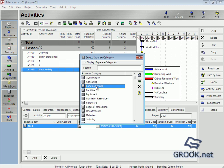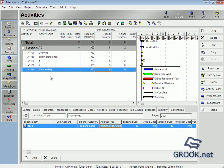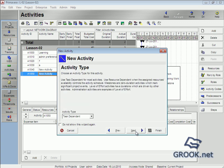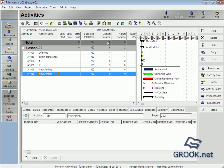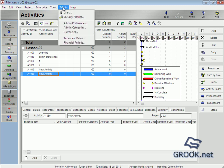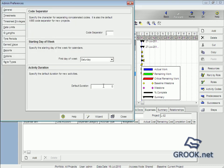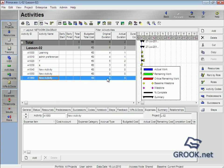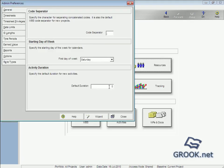In our projects and WBS, if we add a new activity, the wizard helps us enter data — Next, Next, Next, Finish. Here we find original duration is zero because in Admin > Admin Preferences > General, we set it to zero. So if we change it to five, close, then add a new activity — Next, Next, Next, Finish — it will be five. To understand this data and where we use it, we go back to home and here we set it back to zero.